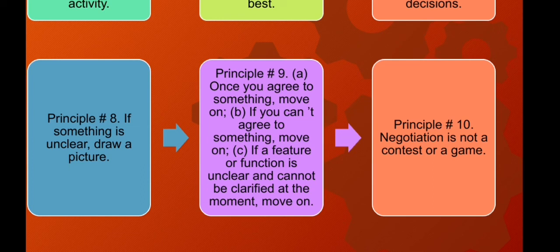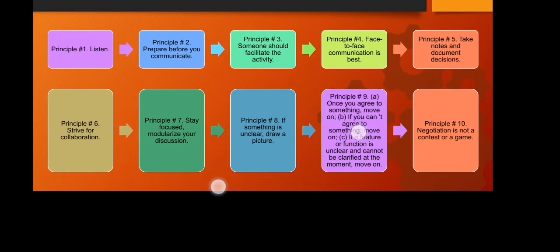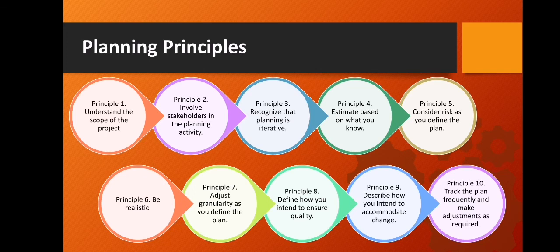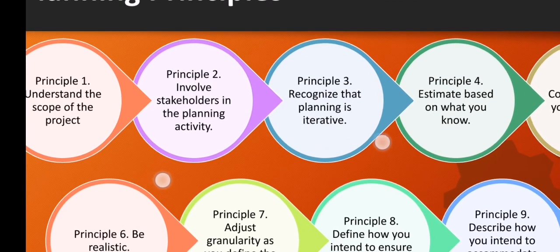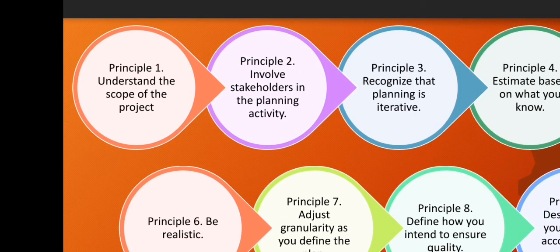Those are the ten communication principles. Next is the planning principles — there are ten. Principle one: understand the scope of the project. It is sometimes impossible to use a roadmap if you don't know where you're going, so the scope provides the software team with a destination — you should have a goal. Principle two: involve the customer in the planning activity. The customer defines priorities and establishes project constraints, which is why they should be involved during planning.